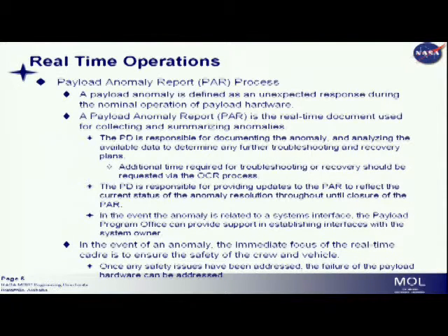If you do need additional crew time to do troubleshooting or recovery, once you understand that and you have your plan well laid out, you'll submit an operations change request to make available the procedure that we'll need to use and also request the amount of crew time that'll be required to accomplish that procedure. You'll be responsible for updating that PAR throughout the process of the anomaly resolution until you are ready to close that PAR.